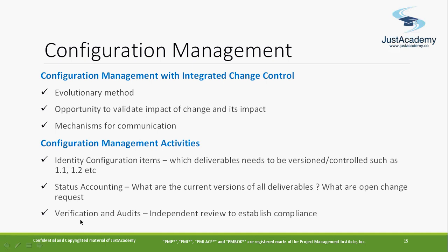After doing the changes, you verify whether everything is well and good or not. For managing this, you create a configuration document, and you have all those things, and you create different versions and different logs if any new changes are there, as a separate document, not as part of project management.